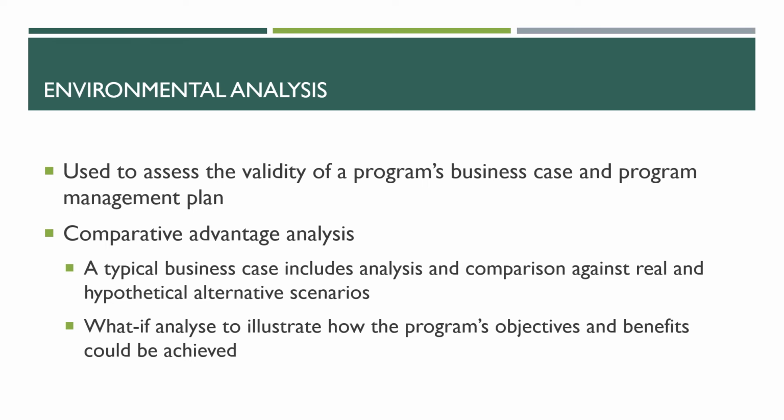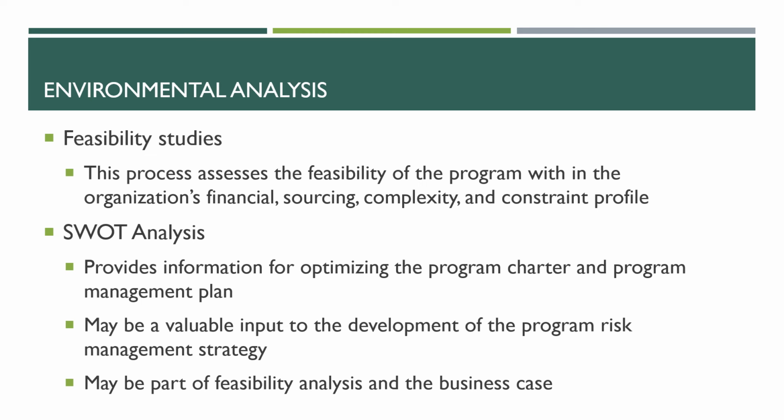and program management plan. The first one is the comparative advantage analysis. A typical business case includes analysis and comparison against real and hypothetical alternative scenarios, a what-if analysis to illustrate how the program's objectives and benefits could be achieved. So you can compare and see the benefits and which is the right set of programs to go with. The second is the feasibility studies.